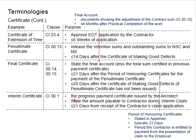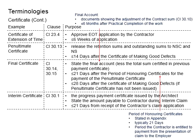Next, there is the interim certificate, found in Clause 30.1. It is related to the progress payment certificate issued by the architect. The contractor may claim for the work that has been done from time to time, and the completed work will be checked by the architect or the quantity surveyor. Once the amount of work done is confirmed, the interim certificate will be issued and the contractor is entitled to claim for the work done. This interim certificate will need to be issued within 21 days from the receipt of the contractor's claim application.